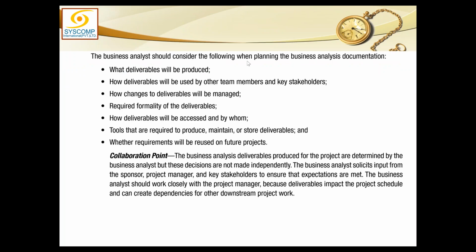The business analyst should consider the following when planning the business analysis documentation. What deliverables will be produced? Create a list of all the deliverables. How deliverables will be used by other team members or the key stakeholders. How changes to the deliverable will be managed. What is the required formality of the deliverable, how formal it is, how deliverables will be accessed and by whom, tools that are required to produce, maintain or store deliverables, and whether requirements will be reused on future projects or not. The collaboration point here is the business analysis.